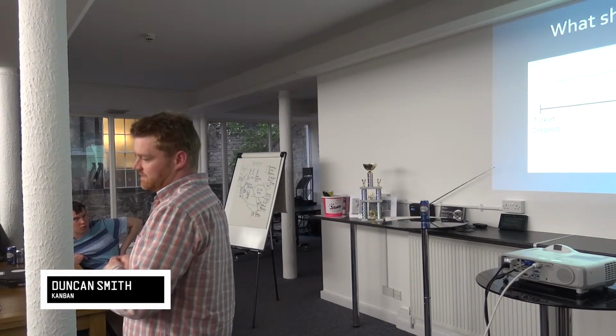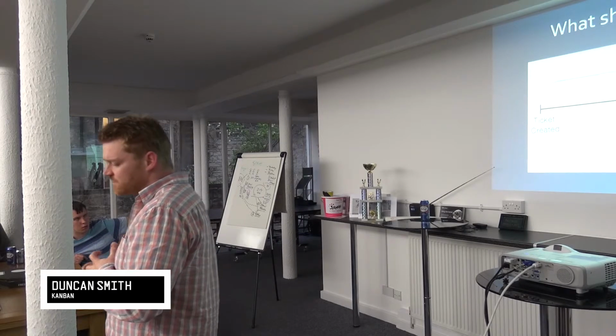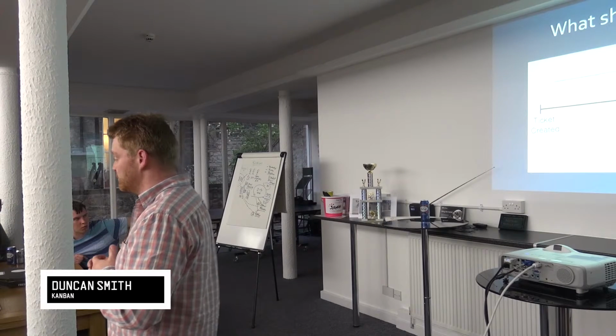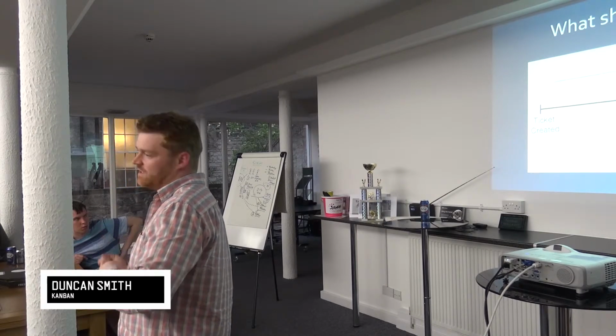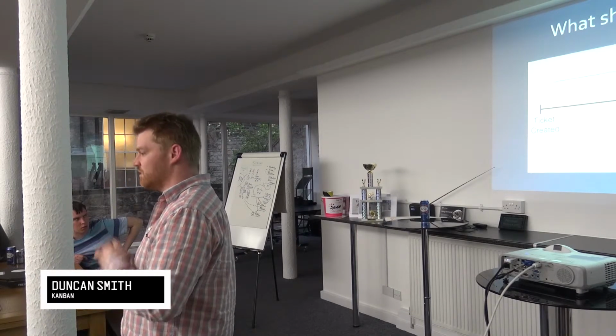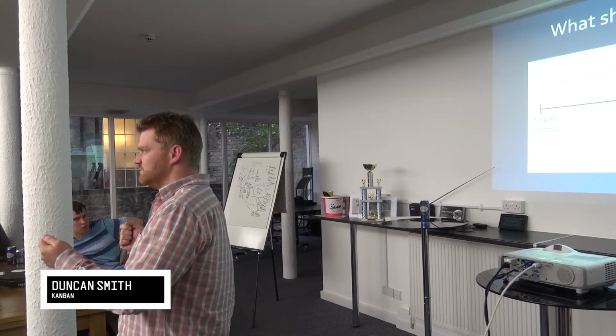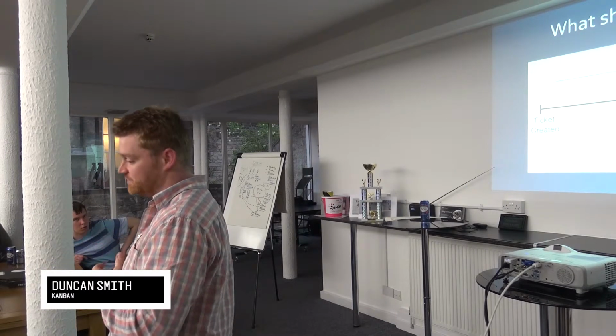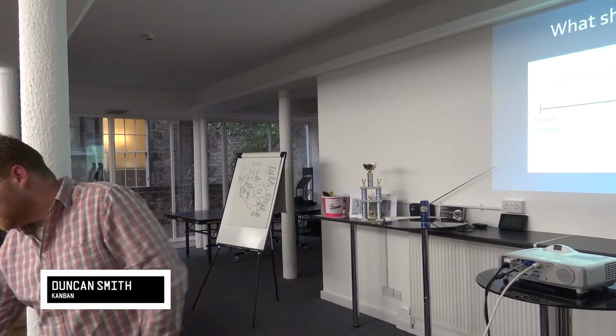How long do I have to wait to get this back out the other side? And then cycle time is much more about your team. How can you understand the processes that your team are using? What are your bottlenecks? Where are you going faster? Where are you going slower? How can you make that part faster? You can't make the income faster. You're not in control of that, but you can make your team faster. So the cycle time is something that you should be looking at.